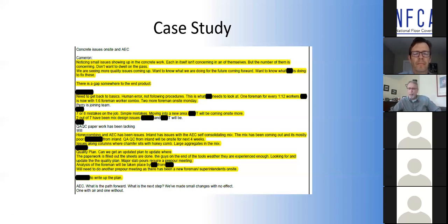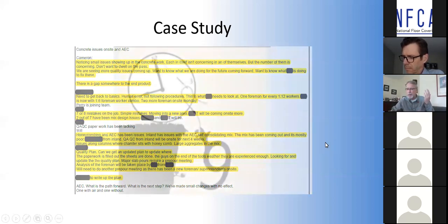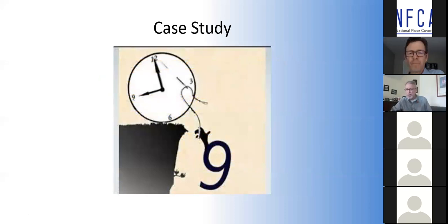Had we had that pre-installation or pre-construction tolerance meeting where everybody was at the table talking about it, and then had a subsequent pre-construction meeting at each phase of the work, I don't care that the floor trades haven't been assigned yet. What it says is we need to change the way we price the project. It's got to get looked after early. And basically at that point, it's a cliche, but a stitch in time saves 9. If we had sat back and held a 2 or 3 hour meeting in October of 2019, we probably wouldn't be having the problems we're having today.